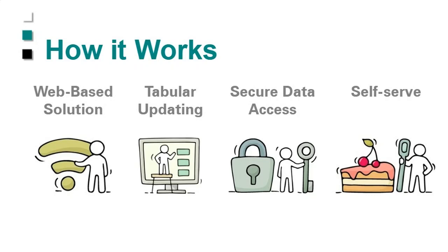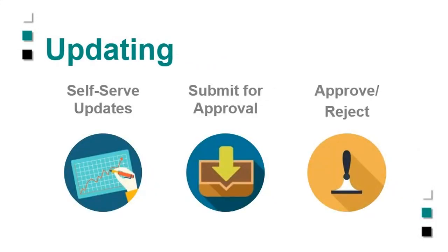This way, your team can self-serve their own activities as they need to, as they get some time to do some updates. It takes the onus of updating off of just the schedulers once a week in a big panic with a lot of overtime, and it spreads out the updating so that the person closest to the work can do the updates and submit them, either to be approved within CAPS or just approved in P6.